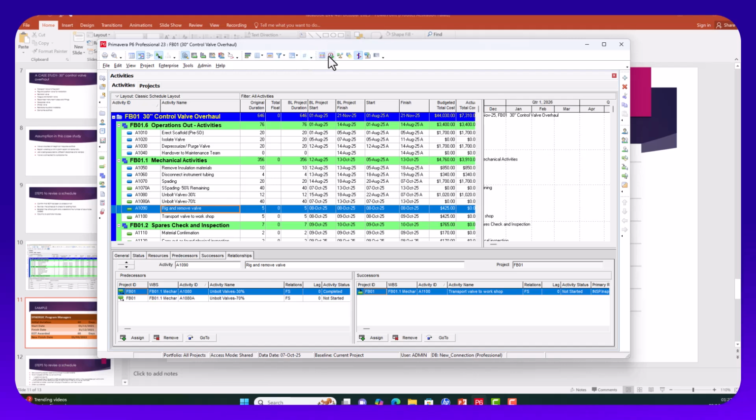So let's click on F9 and see what it gives to us. Where does it land us? If you go in here and check, you'll see 4th December. Remember the date we are chasing. The date we are chasing is 2nd November. That means we need to take off 1 month from this schedule completely, because the client only allowed 1 month for us as variance, as an extension of time.